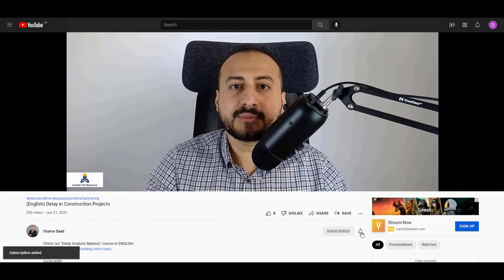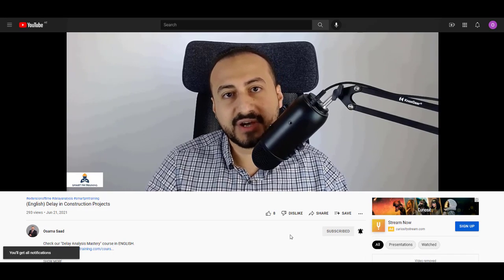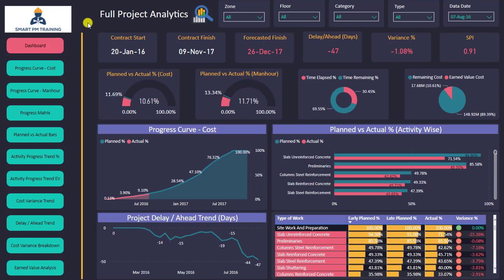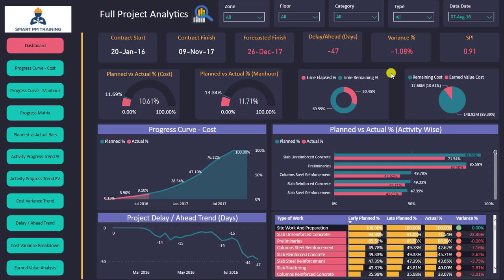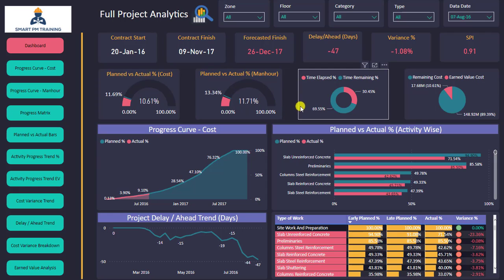Click the alert notification so you will not miss any new videos. This is my dashboard and I have here my key progress indicators: contract start, contract finish, forecasted finish, the amount of delays, variance percentage, SPI, planned versus actual based on cost and based on man hours, as well as the time elapsed and the time remaining percentages.